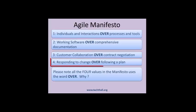Value 4: Responding to change over following a plan. The only thing that is certain when a project starts is change. An Agile team must be able to respond and adapt to regular change, rather than sticking to a plan created at the beginning of a project or iteration. Product requirements are prioritized at the beginning of each iteration, rather than the team agreeing to all requirements at the beginning of a project.